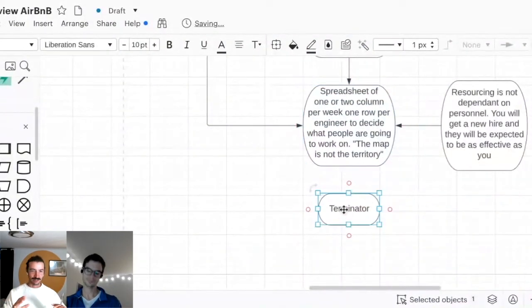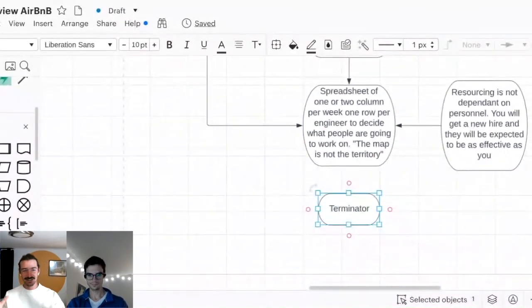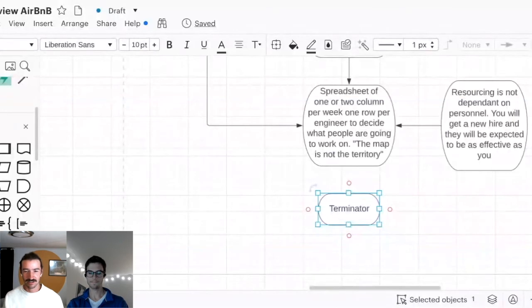Like, okay, you need to build this and we need to build that, and they need to launch at similar times so we can get this out. Or, oh, you have a dependency on this and we have a dependency on that. It's crazy complicated. If you drew a graph of dependencies, I think it might be impossible. It is so hard. So having something where you can tell teams, hey, we're going to try and launch this by this date, and either that will unblock you from doing your thing, or maybe that means we need you to do this before then, is super important. You can't get anything done without that.